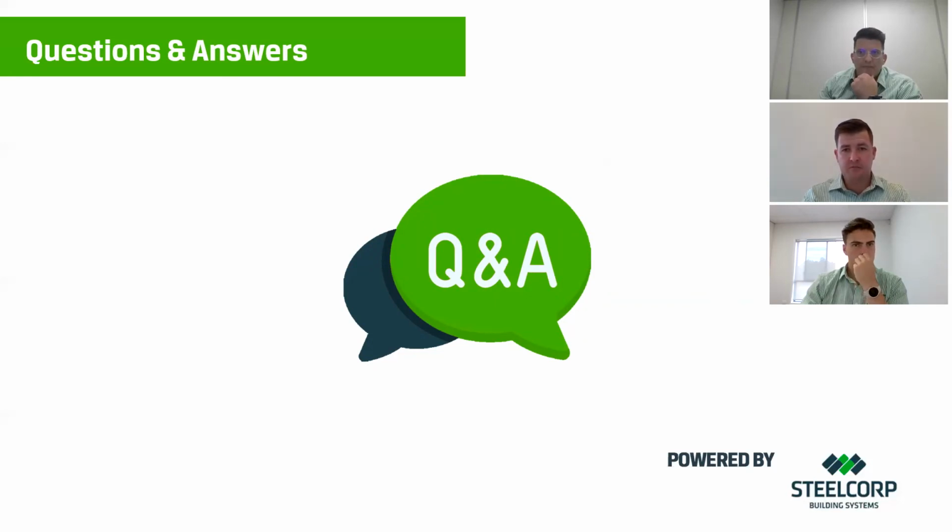And a question here from Adrian, probably one for you, Aaron. At what stage can you get involved in my project? We can get involved at early stages, as we discussed earlier, in the design phase. But even prior to you securing a property, we could look at that property and see if it's the right fit. So we can help with a feasibility study on the land, and not only the land, but the design of the structure as well. The earlier example from Shane regarding the warehouse versus storage complex is very powerful. We were able to double our client's ROI just by altering the structure type we put on this property. Yes, we can even provide square meterage rates so you can get an early budgeting cost.